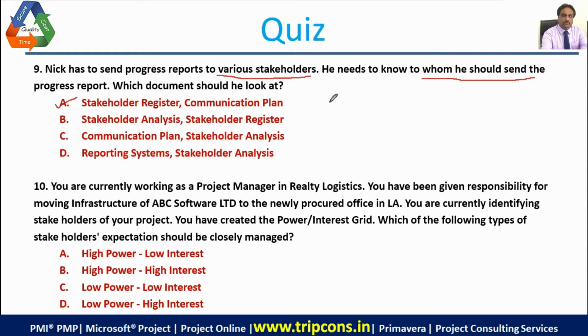The stakeholder register initially consists of the stakeholder contacts, and when you come to communication management, you add those columns regarding the communication, and when you come to the stakeholder management plan, you add the columns for power, influence, impact, and urgency, legitimacy, etc. So that gives you a complete stakeholder management.